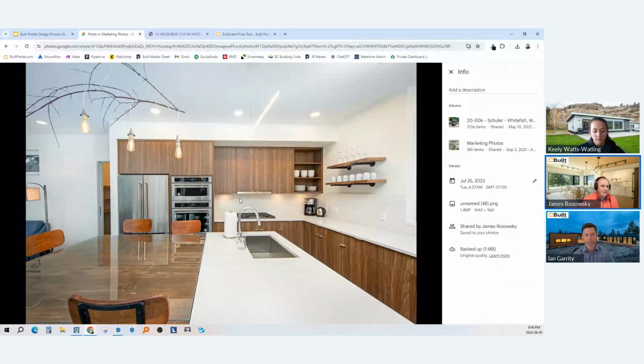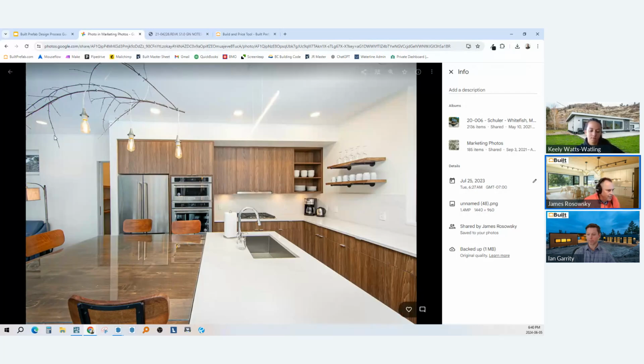Additionally, the hood fan needs to get installed when the cabinets are getting installed. So if you have all this stuff and you're going to put it in when you get it, it's sort of in your hands if it's exact or not. Obviously we're going to work with you, but it's a lot easier if it's happening where they're installing everything.